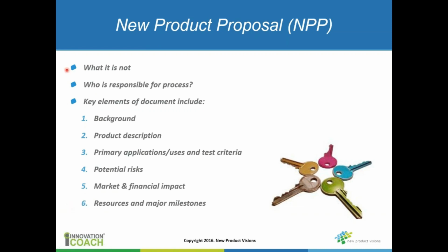because the project has a relatively high level of uncertainty. Until you actually build a prototype, until you really know what you've got and what you need to develop and what the risks are, trying to decide when you're going to come to market with that can set the organization up for failure.